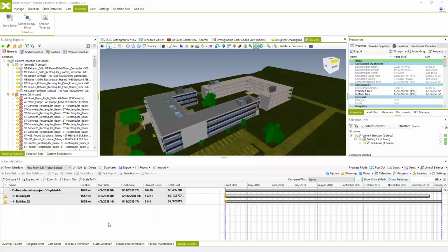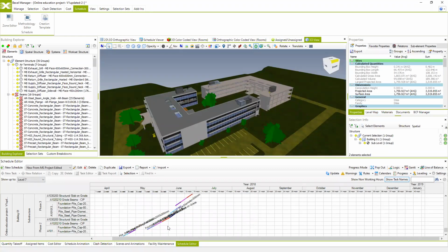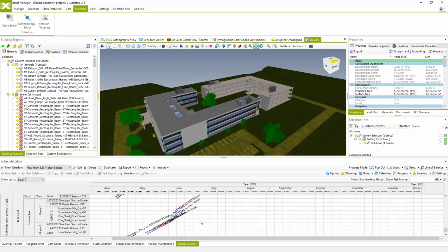And that's why we believe that not just the Gantt chart, which I presented in a previous session, is important, of course, but also the line of balance. When we're talking about the construction industry, we need to have the line of balance or flow line view, because in the construction industry, all these tasks and activities are organized in different zones, levels and phases.